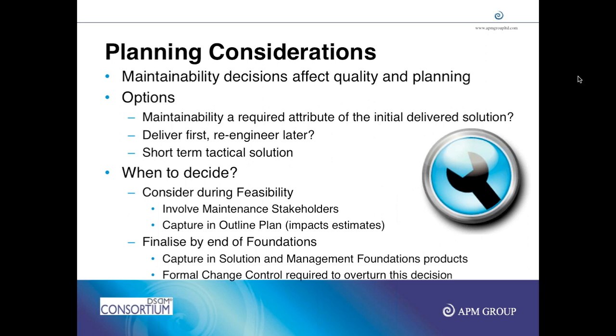There are two ways to implement it. I could make it a very flexible, generic design, something like a normalized database design, which is scalable. Then I need to do a very good design from the technical point of view, the database point of view, and the design point of view. This takes a long time for me. This takes good resources as well, and it has to be reviewed and tested as well. If I do all of this, I take 2 to 3 additional months, which means you might not finish in July, you might finish in October for the first increment.